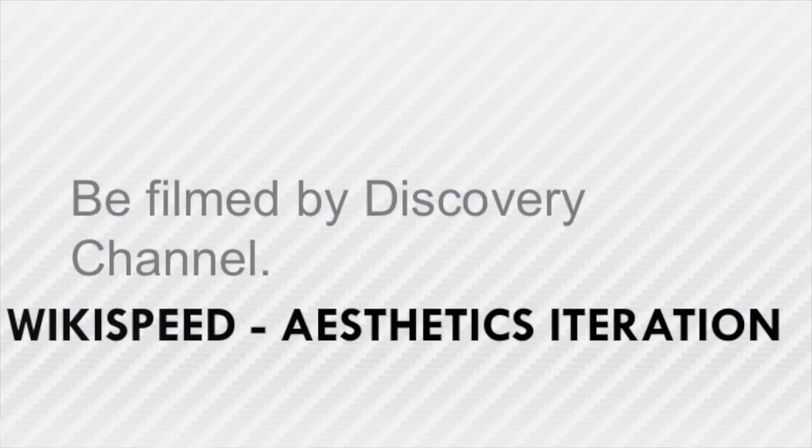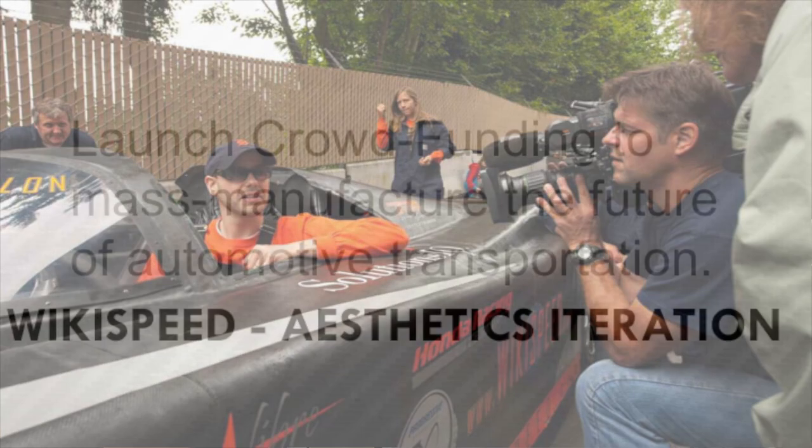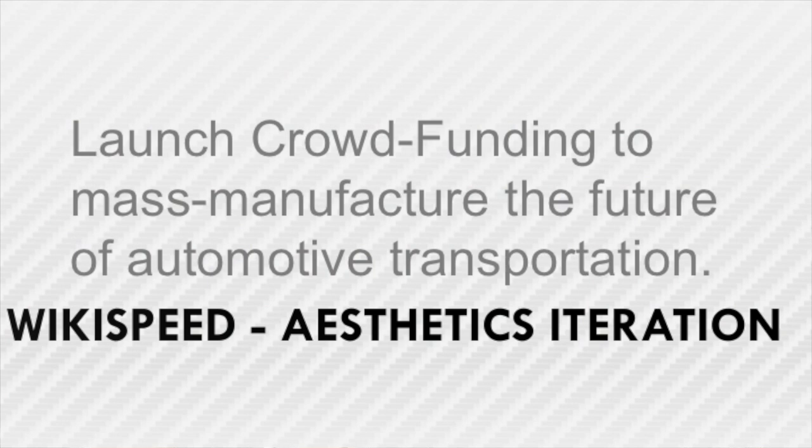The Discovery Channel came to film us, and we asked them for permission to use that video in a crowdfunding campaign. And we launched that crowdfunding campaign from one iteration to finance the next. The idea here being, we don't want to be funded through the end of the backlog because it changes every sprint as we learn more. We don't want to be funded to milestones because then some funder has a perception that that's what they bought and we've lost a level of agility. What we aim for is to make sure we've done something so awesome this sprint that someone will crowdfund our next sprint, and it's worked every time so far.